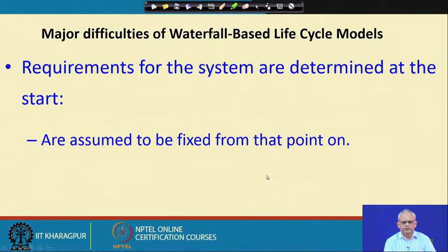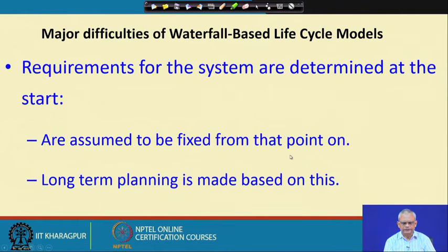One of the major difficulties, I will say that this is one of the difficulties which is acutely felt, is that requirements need to be defined at the start, and from that point it becomes fixed. And not only that, the project manager makes plans based on the requirements, what are the phases, how much time the phases will take, and so on, and any change there upsets the manager's plans, and it increases the cost to a large extent if any change is accommodated.